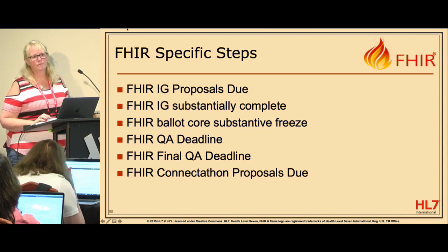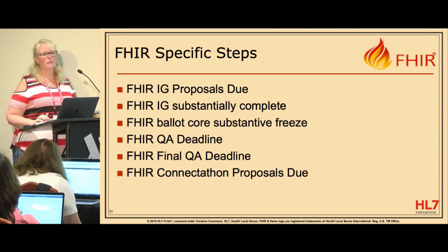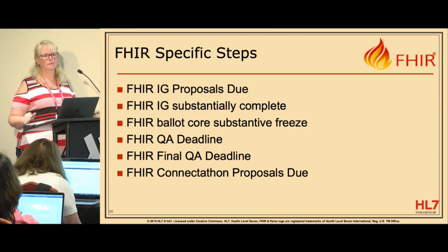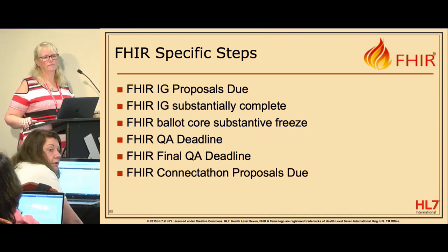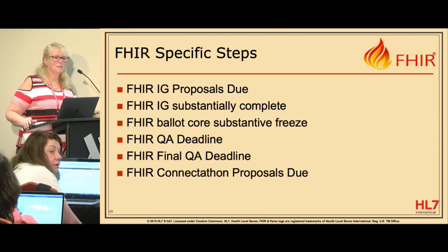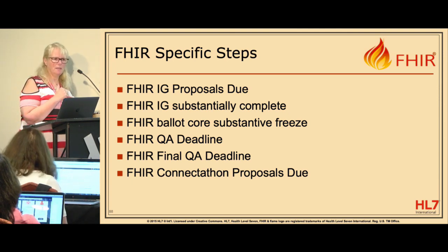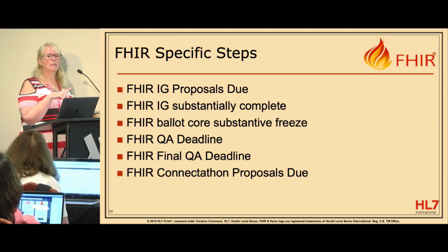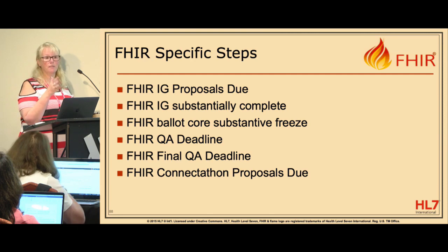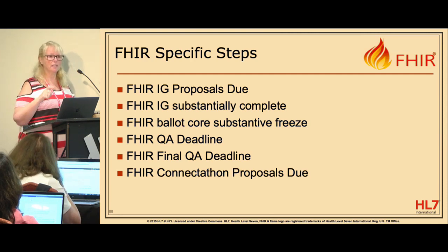So how does that approval need to be documented? We kind of had a situation with ours where they were like, yes, I know we've seen it, we're good, go. But does there need to be a vote recorded? Yes. If they're going to shorten the QA period, they need to vote in their minutes, and that needs to be documented. Okay, it wasn't a shortened QA period? The final approval of your IG to go forward also needs to be approved into their minutes.